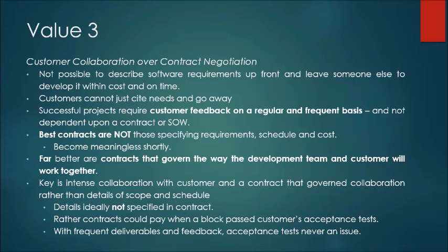Because of this agreement, because of this involvement, because of the participation of the customer, even though the cost increased to 4 times. Why? Because the needs changed, because the expectations changed, because the documentation took a back seat in the changing environment, changing needs. Therefore the customer did not mind that, because he knew he had been changing the requirements, the expectations, the functionalities, and therefore the cost had to increase.